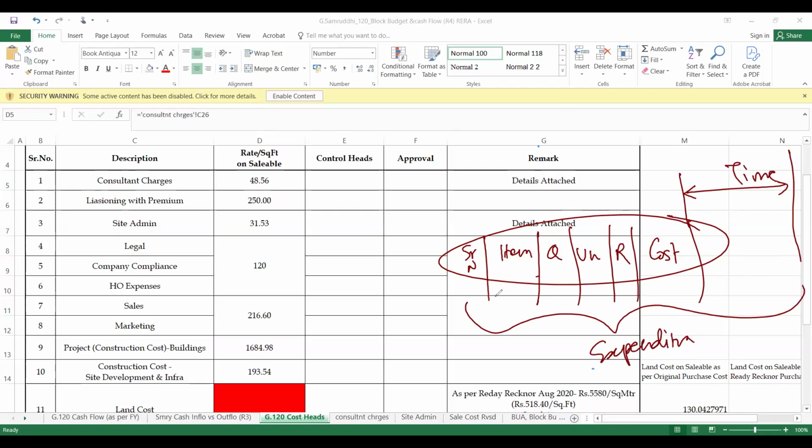So for example, if I write architect design consultancy, quantity in whatever unit, square feet, say 8 lakh square feet, whatever rate, say around 12 rupees. Whatever amount arrives here, I'm not discussing a simple transaction, say it is around 90 lakh rupees.